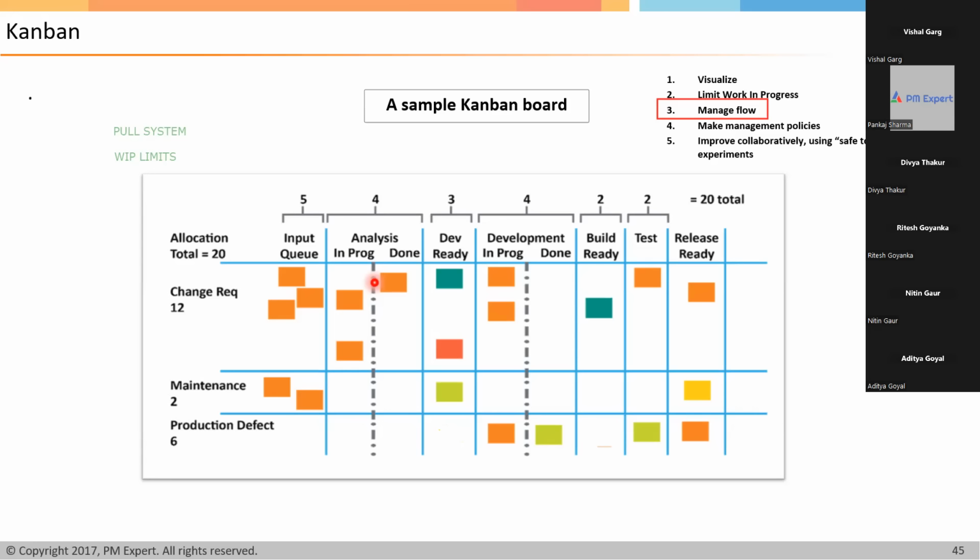So how do we find out where the root cause is for the problem? You can see, if you're updating your Kanban board on a regular basis, will you be able to find out or not? Even if it is updated on a regular basis, if the successor is full, they are not going to clean the previous column, because they are full. So who will become full first, successor or predecessor? Successor, obviously.